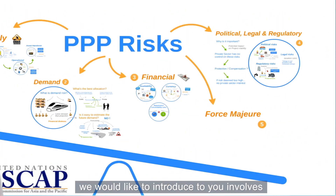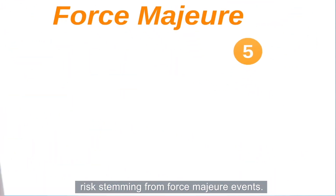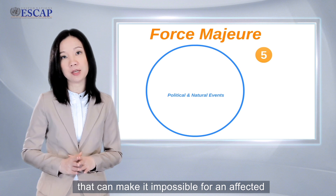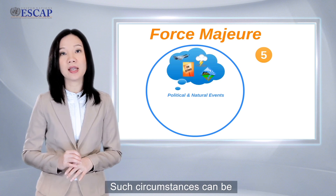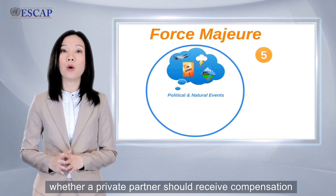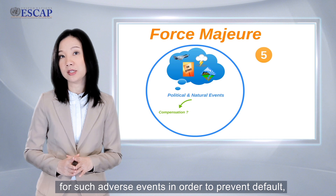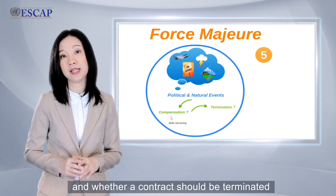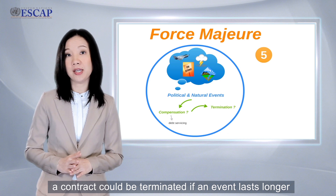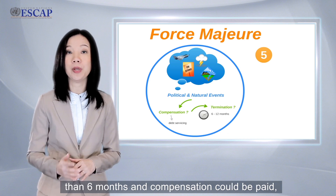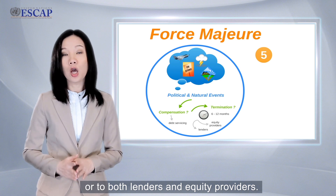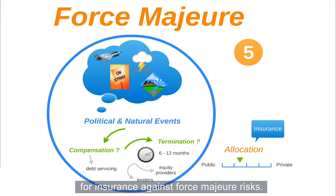The last category of risks involves force majeure events — circumstances beyond the control of contracting parties that can make it impossible for an affected party to fulfill its obligations. Such circumstances can be the consequence of natural disasters, civil wars, and so on. Key questions are whether a private partner should receive compensation for such adverse events in order to prevent default, and whether a contract should be terminated if such events are of considerable magnitude or duration. For example, a contract could be terminated if an event lasts longer than six months, and compensation could be paid — depending on contractual arrangements — either to the lender alone or to both lender and equity providers. Compensation mechanisms, however, are no substitute for insurance against force majeure.